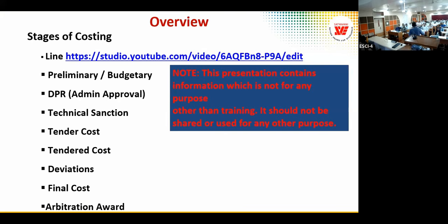And what they did was QCBS, they gave 80% to technical, 20% to finance, and they have seen to it that the higher bidder got 80 points, both the finance and this, and the other bidder got 79 points. And they paid 100 crores more fee to the consultant. This is the other side. We are talking about low fee side. QCBS can be misused this way also.